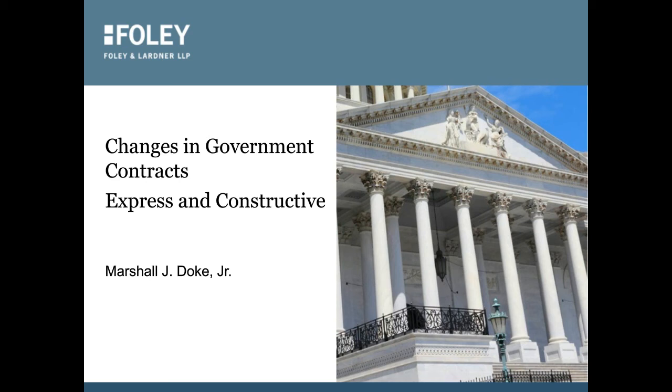But the fact is that if you have incurred the cost, you may not have had a work order for it, but you can estimate that, and you have incurred that cost. I always do that in litigation because I want that judge to know that we have incurred that cost, and we're not just estimating what it's going to be in the future. There are several approaches to prove cost: the actual cost accumulated, the total cost method, which is non-favored, modified total cost, and the jury verdict method. These are methods of proof, but some of them are frowned on.